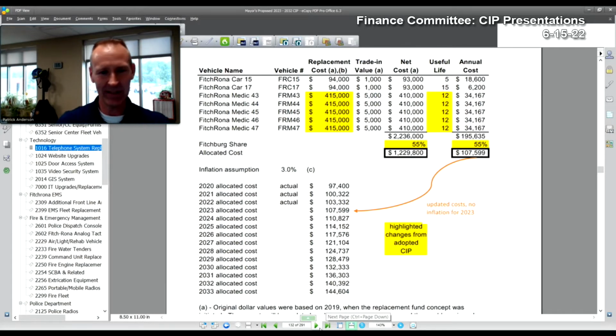Again, once we expand to a fleet of 12, even moving that to 3 years now, that's keeping an ambulance for 15 to 18 years, because we have such a large fleet. Moving just one purchase 3 years actually bumps everything out 3 years. That's keeping them for a pretty significant amount of time. The other part of that is that with the fleet replacement, we replace essentially everything that goes in it, which is our cots, our monitors, radios, and a bunch of other high-dollar items that truly only have a lifespan of about 7 to 10 years.